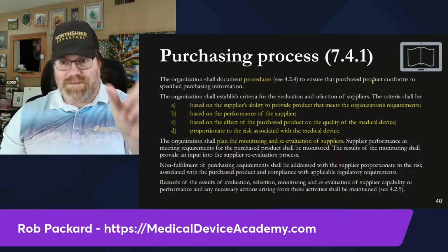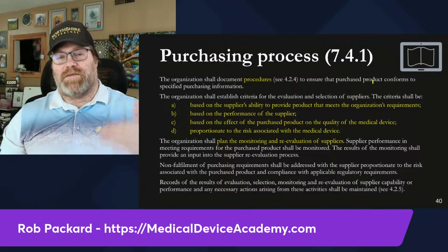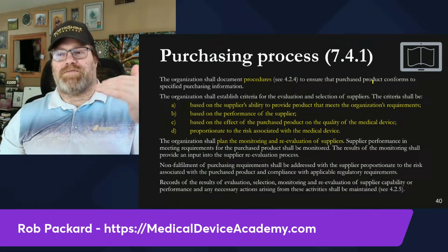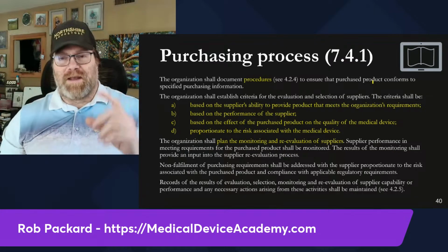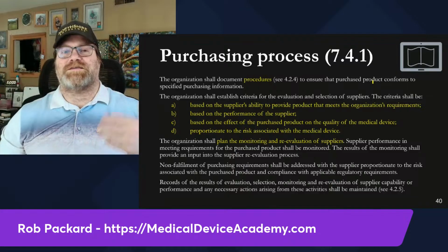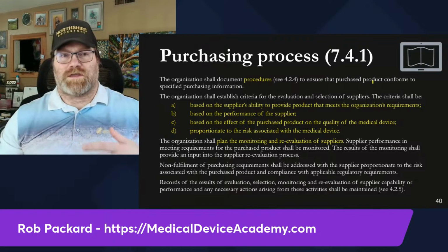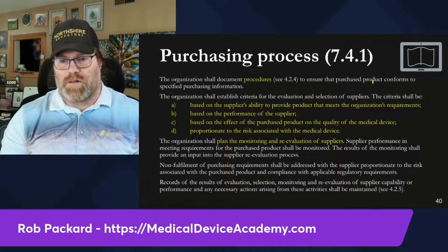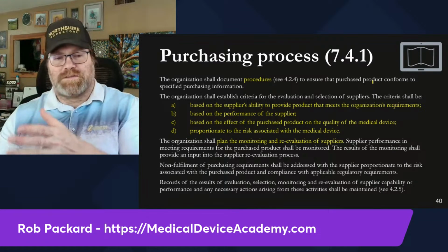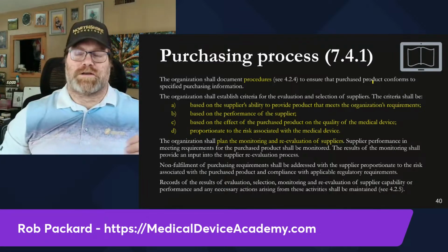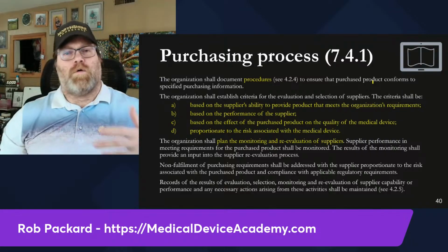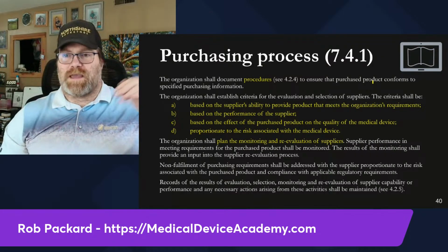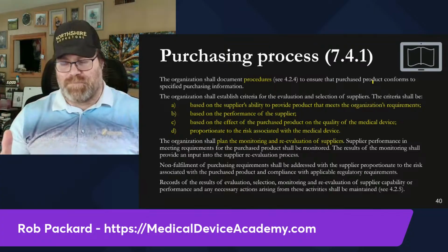And they list: here are the vulnerabilities we found, this is what we did, this is the approach we took, and this is what we found. Think of every single thing they find as an audit finding. Just like an internal audit, you're going to take those results, and for each one open up a CAPA, or a JIRA ticket if you use JIRA, and ask how we are going to contain this problem.